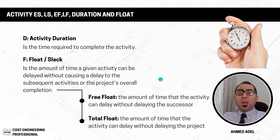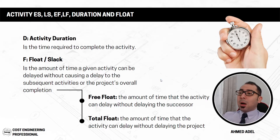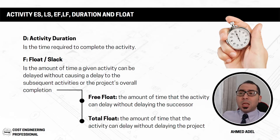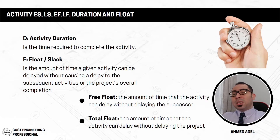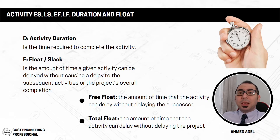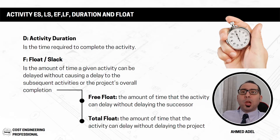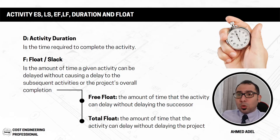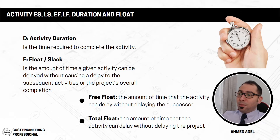There are two types of float. Free float is the amount of time an activity can be delayed without delaying its successor — the next activity. For example, if an activity has two days of free float, it can be delayed by two days and the next activity will still start on time.